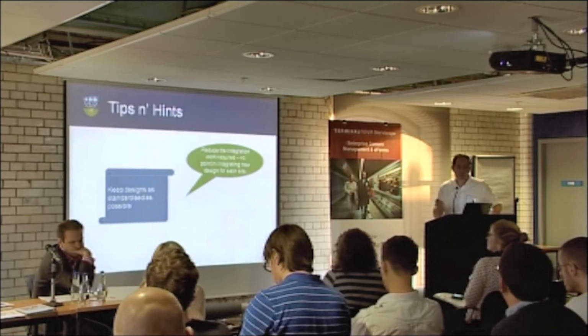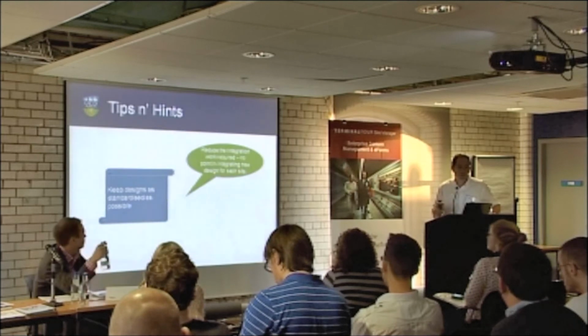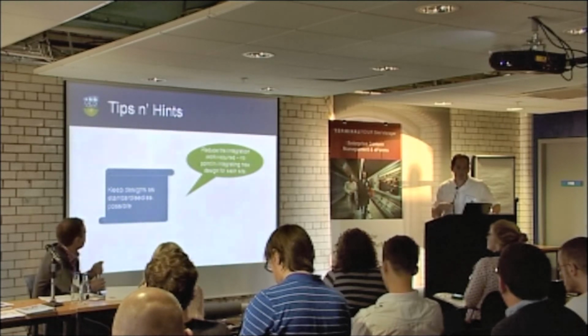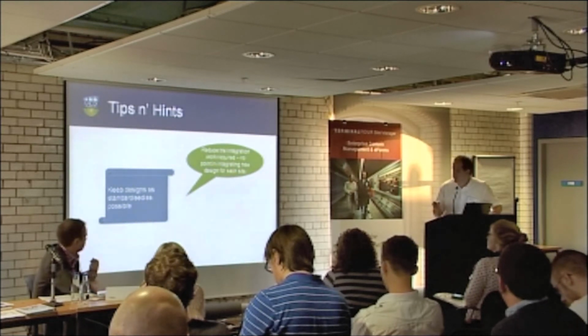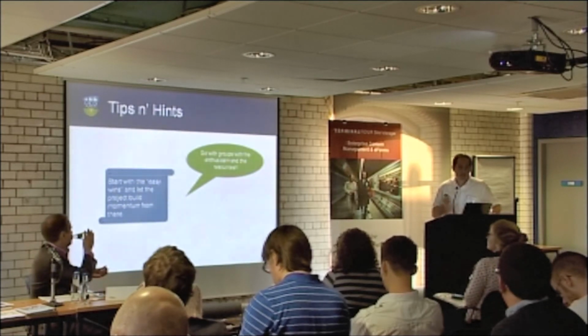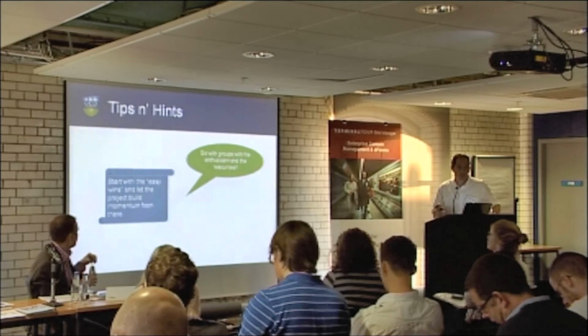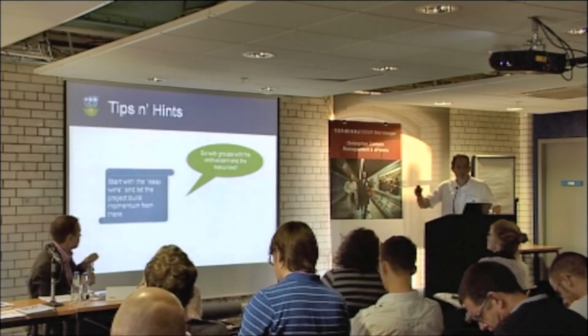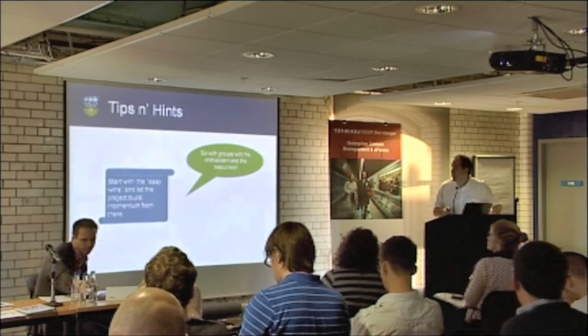There are all the economies of scale coming from keeping your designs standardized. You certainly don't want to be integrating 10 or 15 different designs and customizing those. That'll really slow things down. Start with the easy wins, start with the people who are keen and who have the resources to actually deliver on the projects, and then certainly from our experience the overall project builds momentum from there.